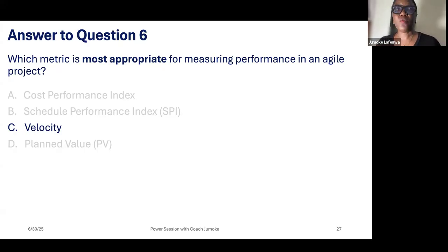Before you start the work, you have itemized all the work. You assign story points to each, and the cumulative story points you say you can do in an iteration become your velocity. And you cannot even compare velocities of two different development teams, because the components of what they are doing differ. So it's velocity.